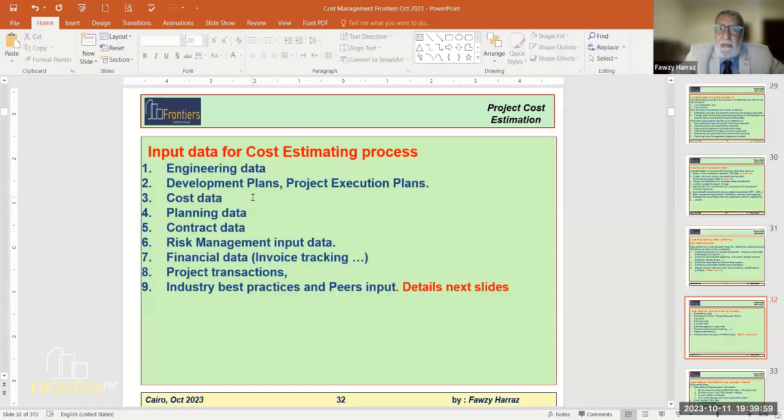The actual value, considering the devaluation of money, I mean, you don't get this money at the beginning, you get it over 3 or 4 years. So the net present value of the price will not actually be 1,300,000,000. It will be something less because of the forward escalation and devaluation of the money. I mean, the dollar today is worth more than 1 year from now and much more than 2 years from now. I hope that this is clear.